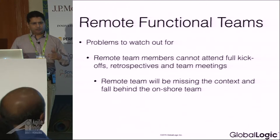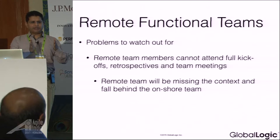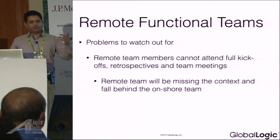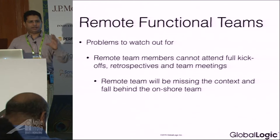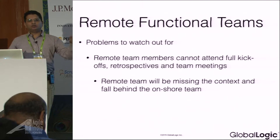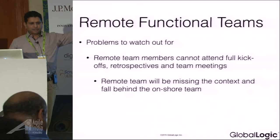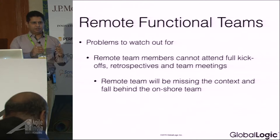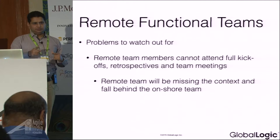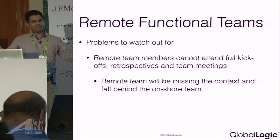One pattern we created was a common time window in both locations — in US as well as in India. For example, in the evening we had a two-hour common window from six to eight, in which no one could do local meetings. US people couldn't have their own local meetings during that time. That time was devoted to the whole distributed team. So in case you needed to communicate with any person, he would be available every day. If you don't do that, you'll have problems with people not being available.